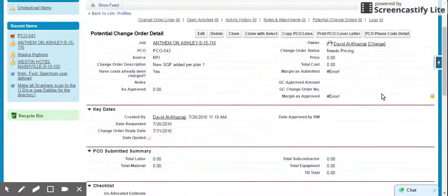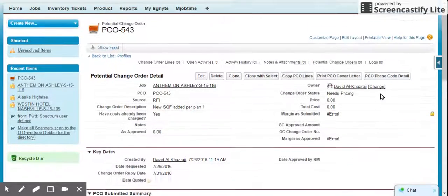Okay, now that I've got my change order created, and I went offline and used Timberline estimating to get pricing for this particular change order, I need to create an allocated and an unallocated output from Timberline, one with all the detail, and of course, one with just summary information. And any plan drawings or any detailed subcontractor quotes that you did use for your change order.